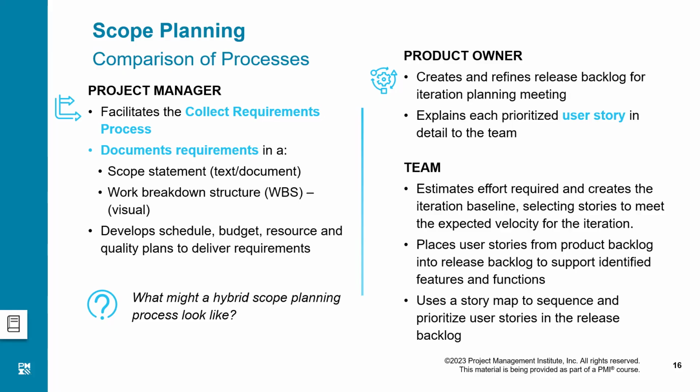For example, your project is to be released to the customer in 3 different release points. So one was the product backlog, then we have got separate backlogs for each release point. And within the release backlog, we have got iterations, and in each iteration, we have its own backlog. Iteration backlog. The items we have picked up to do in this iteration are my iteration backlog.